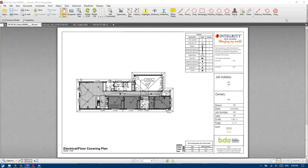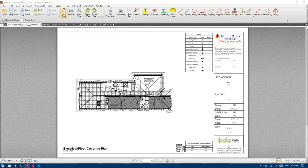Well, if they went to court, you as the builder are deemed to be the professional and you have to consider the plan before you accept it. You'd be wearing the liability in general terms unless there was some other set of circumstances that provided different information.